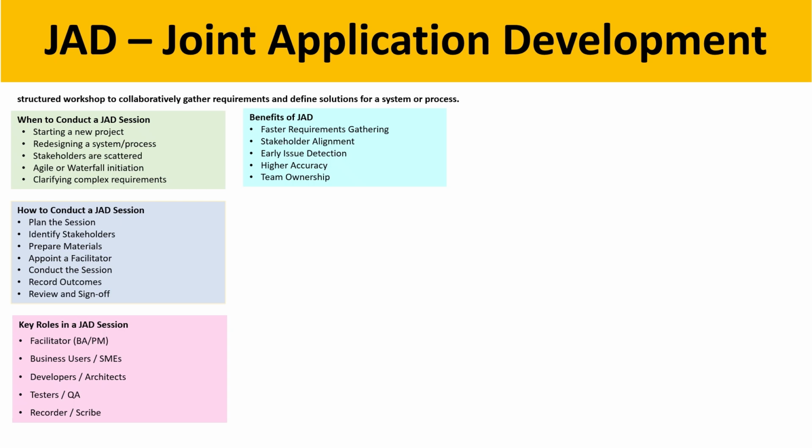After that, once you start your JAD session, try to use different tools like draw.io or a whiteboard, because it will help you to focus your participants on the problem or the flow which you are talking about. Once you are done with your JAD session, you need to give either MOM or FRD, meaning you need to give some documents to all your participants. Clear? Okay, now let's try to understand what are the benefits of JAD session.